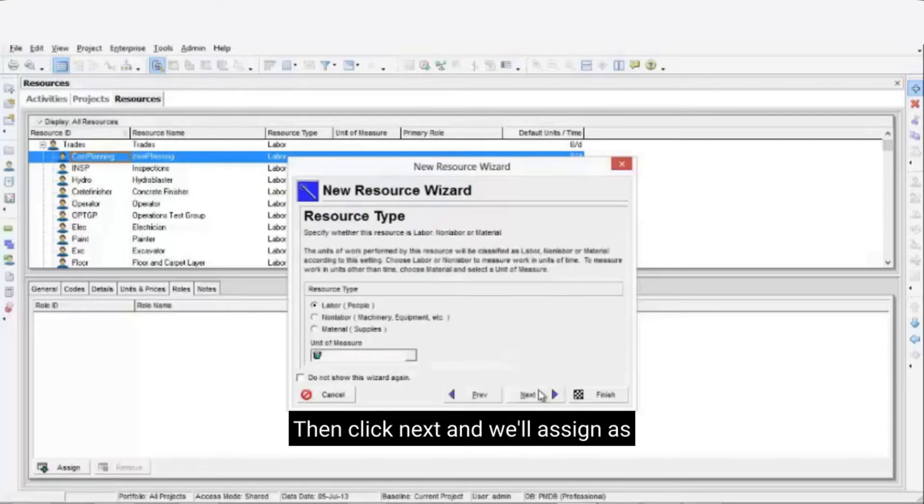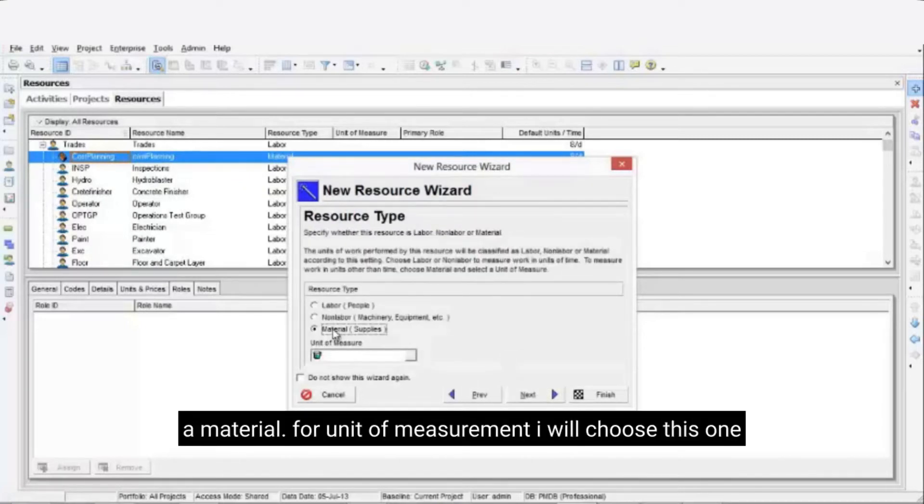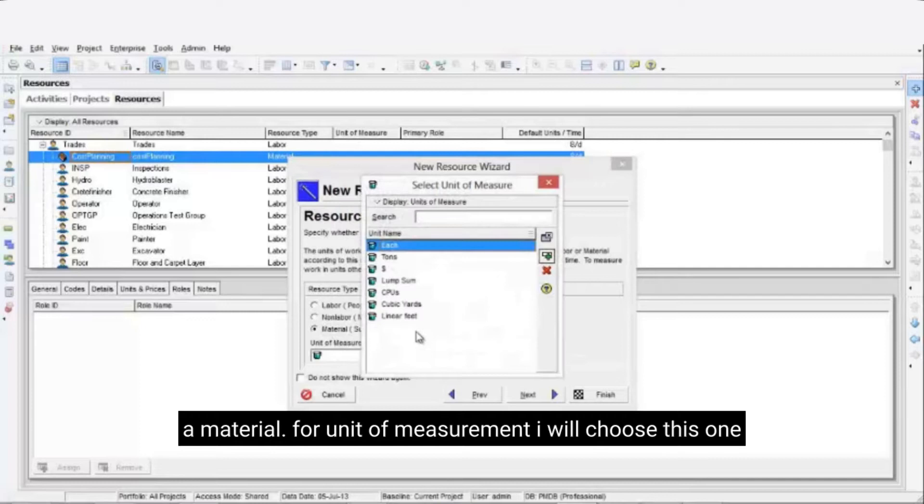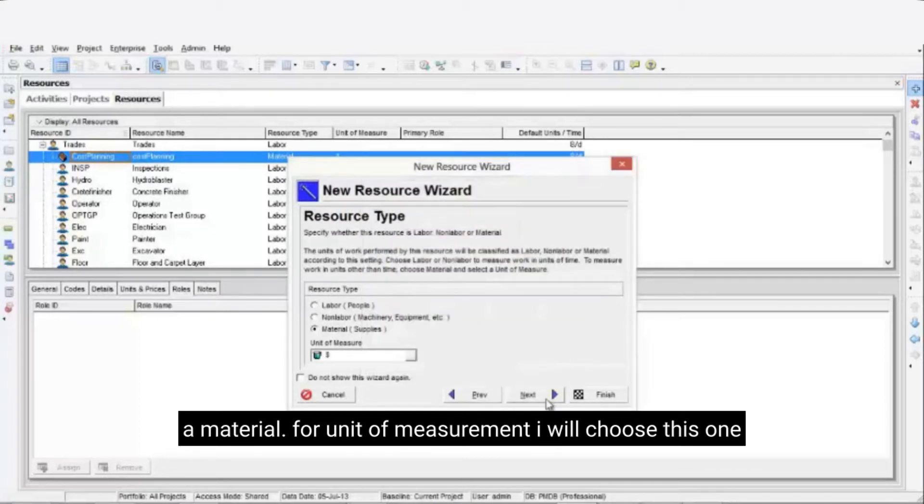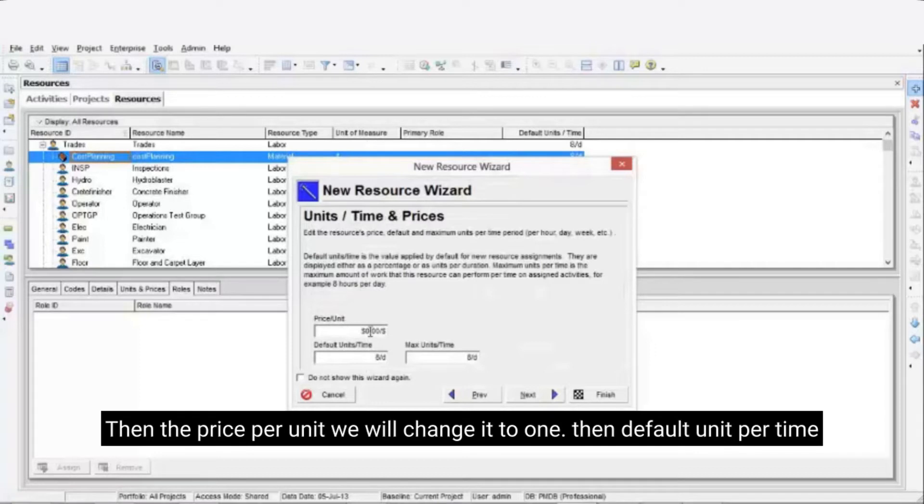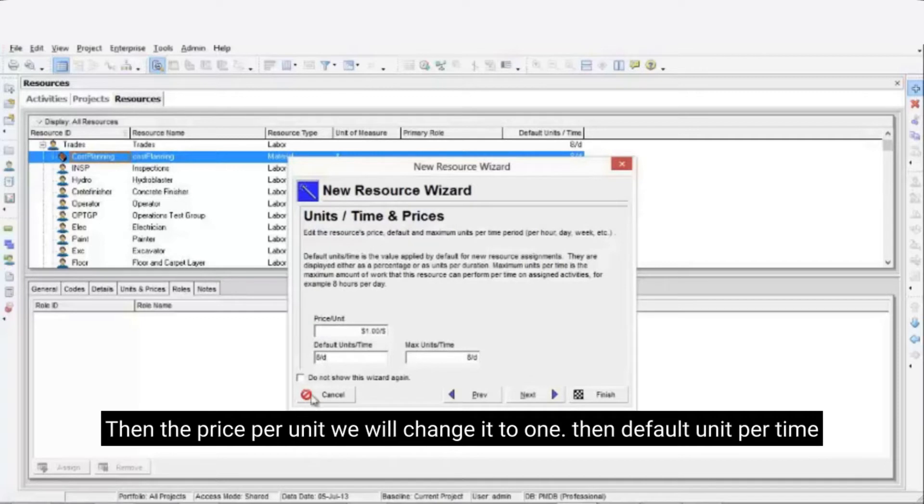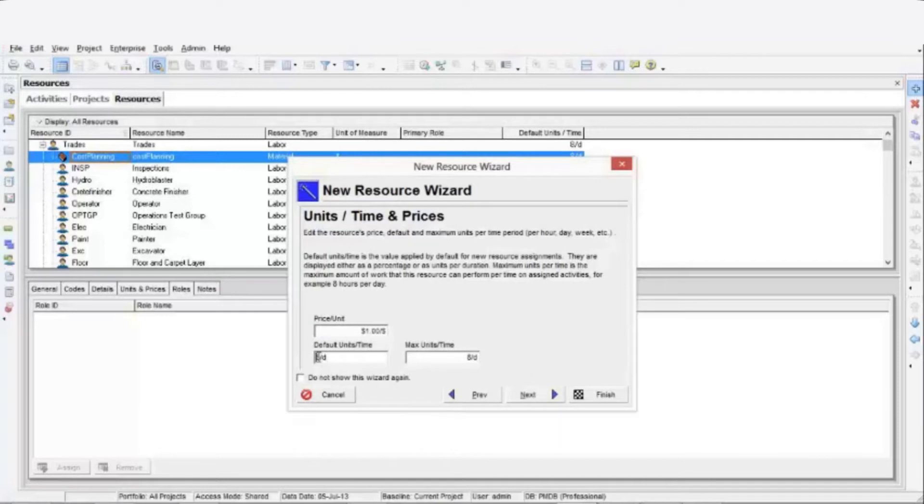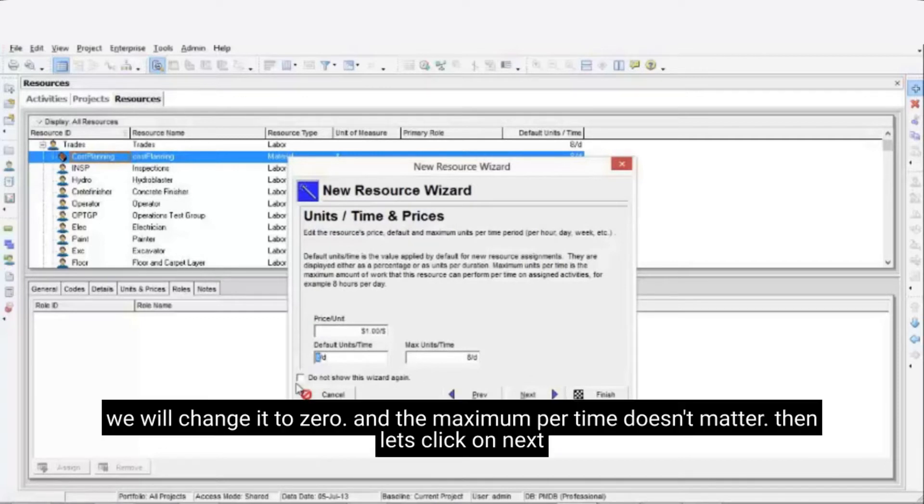Now we will click next, and we'll assign this resource as a material. For unit of measurement, I will choose this one, then the price per unit we will change to 1. Next default unit per time, we will change its value to 0. And the maximum per time doesn't matter, so we will leave it the same.